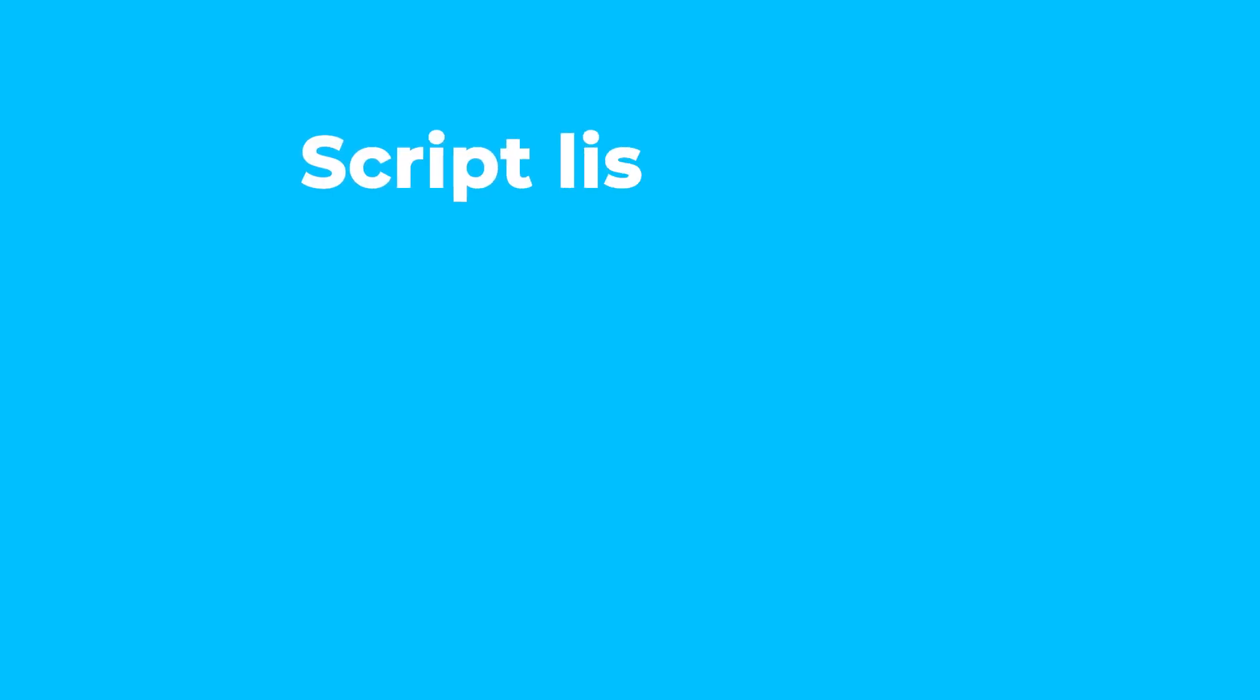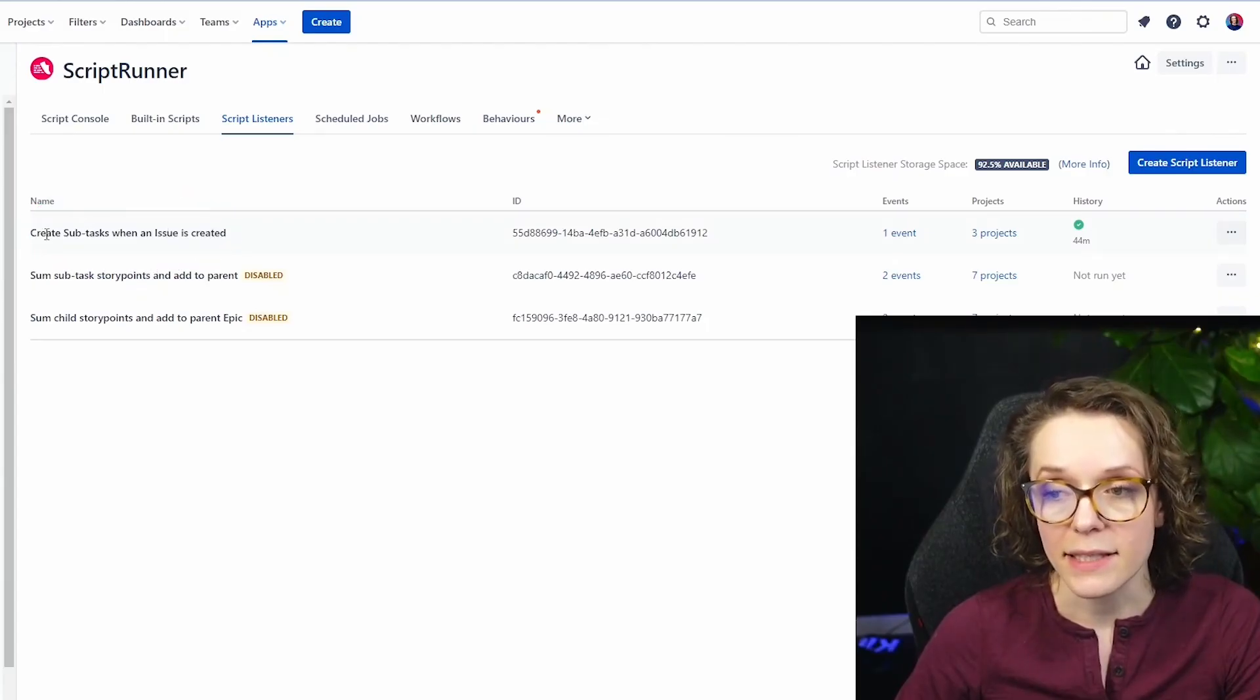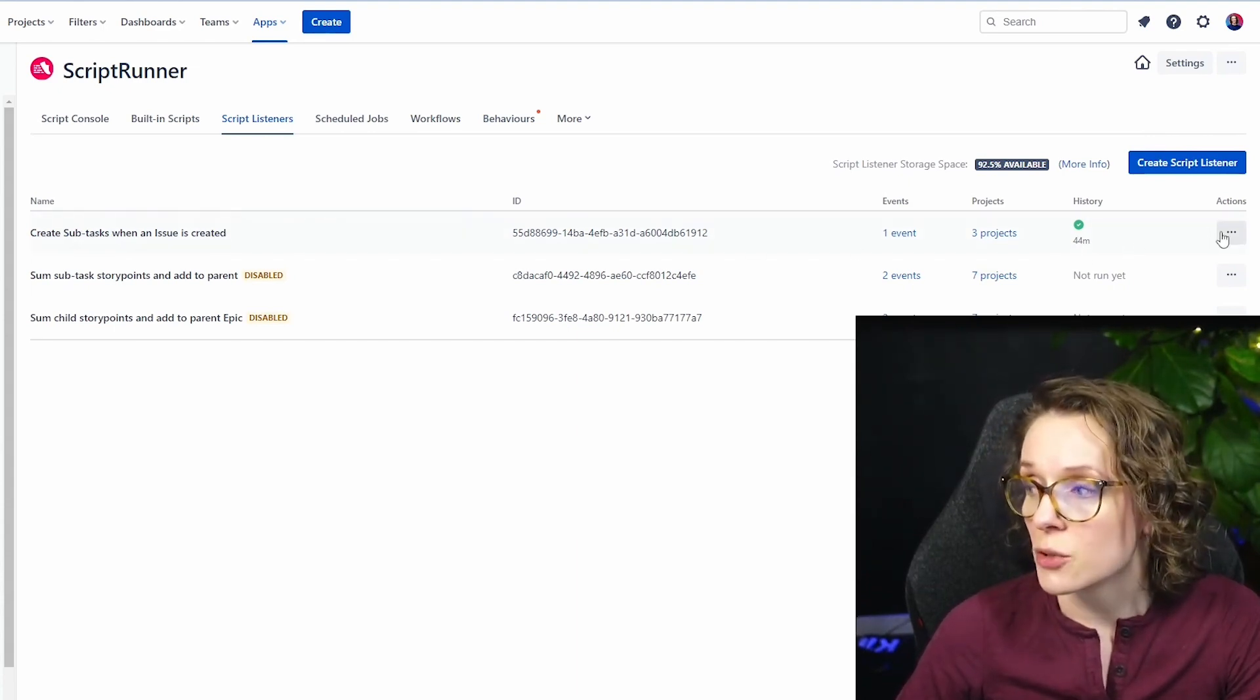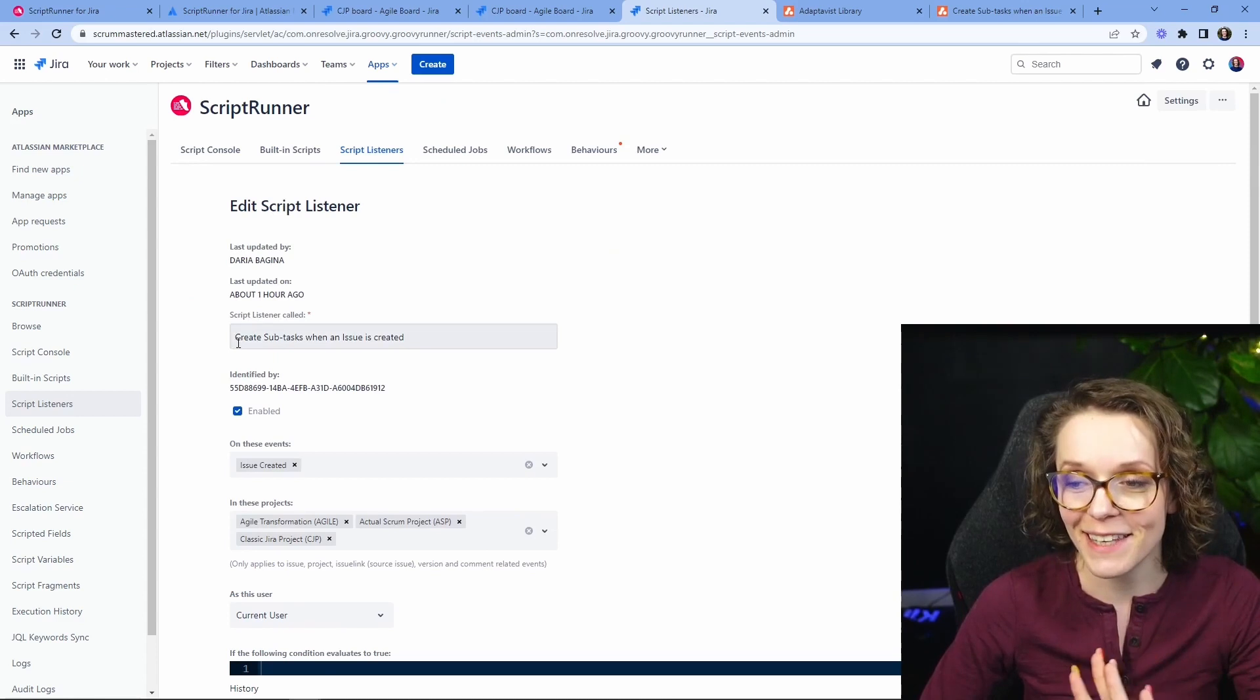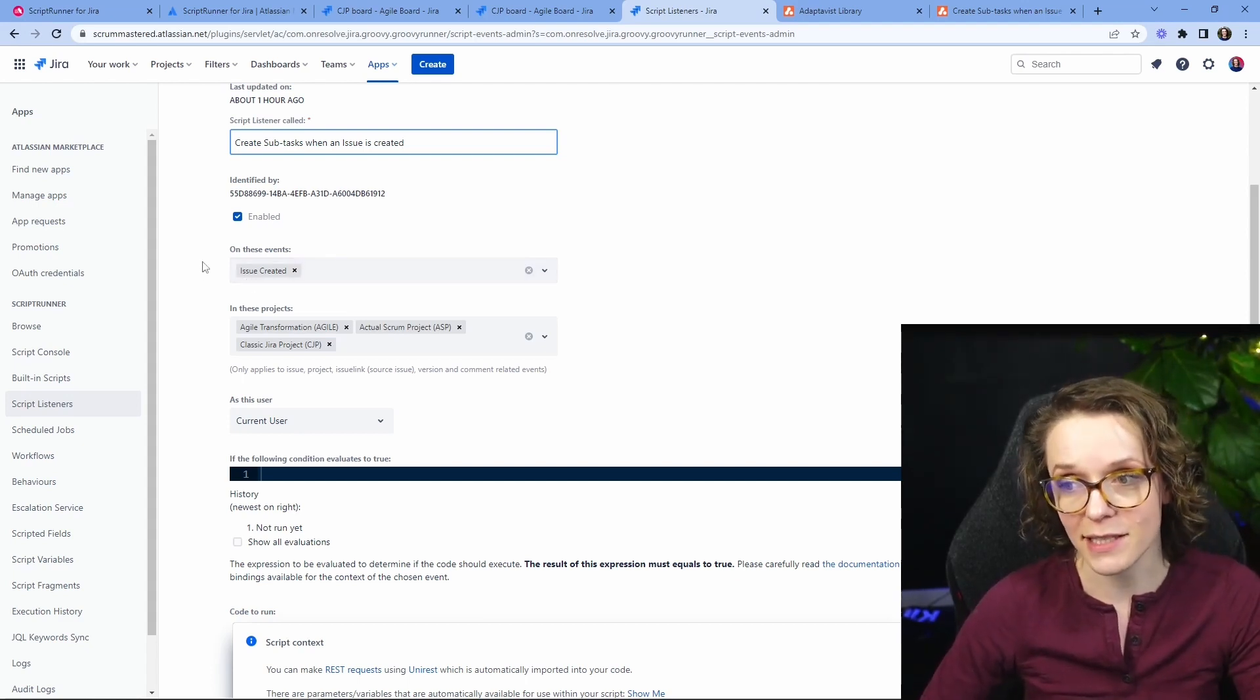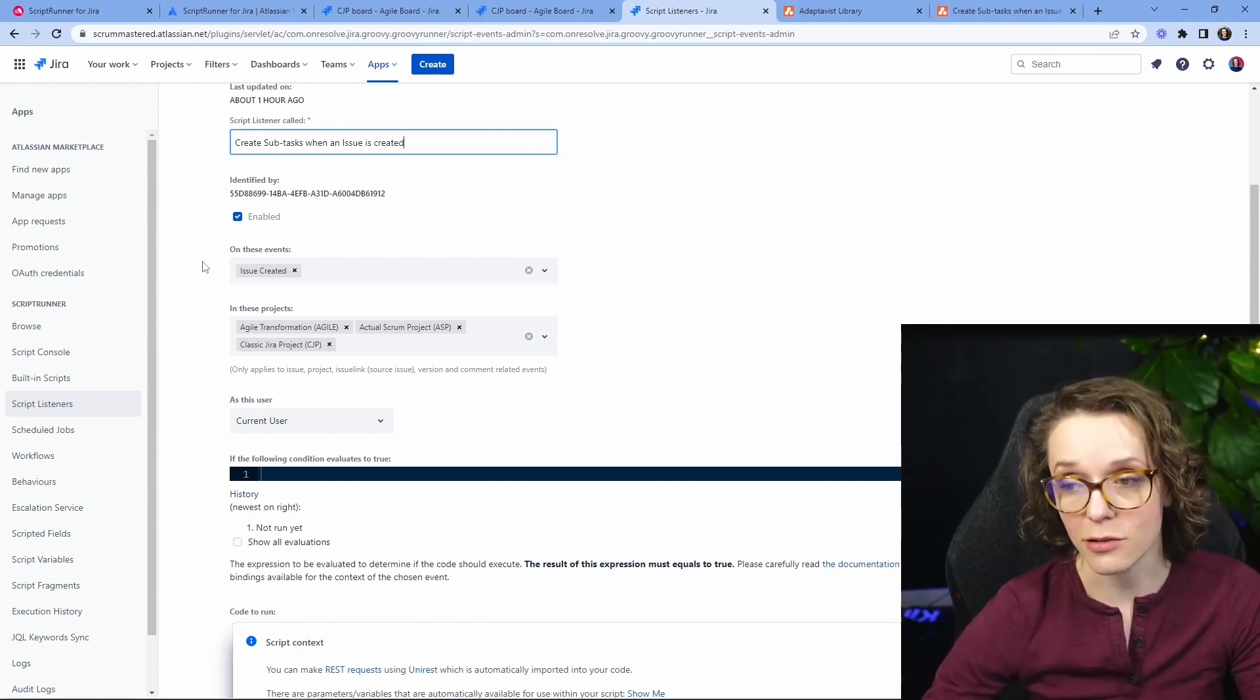Script listeners execute an action automatically in response to a specific event in Jira for example like creating an issue. I added another one and this is basically a use case that creates subtasks when a new issue is created and you can actually you don't need to know any code you don't code here at all whatsoever you come in here you name your script you make sure that you choose when it needs to be run well in this case every time a new issue is created in our project we want to have a set of subtasks to be created.